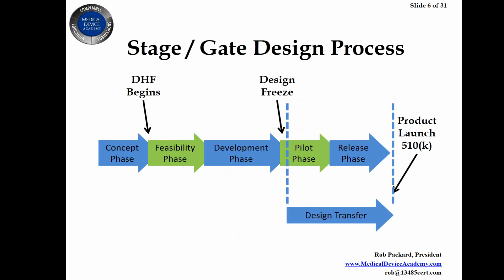So typically, I will say the design transfer begins right after you have your design freeze, and then your 510K product launch will be after you've had all your verification and validation done and you do your final design review. And some companies will do a design review saying it's okay to submit the 510K, and then another one to say that it's okay to commercially release once they have the 510K letter in their hands.